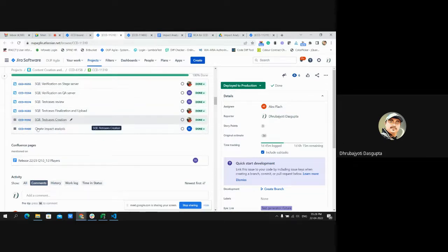So only when an approved, signed-off test case document is attached to a ticket can we as developers move the ticket to the QA bucket. Until and unless an approved test case document is attached to the ticket, we never push the code to QA or move the ticket to the QA bucket. We might push our code to the QA environment, but officially we are not moving the Jira ticket to the QA bucket if there is no test case document attached within Jira.